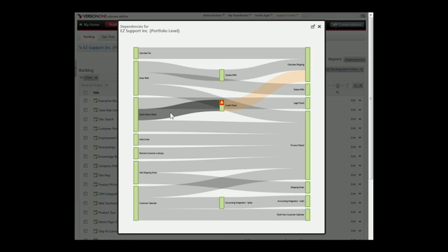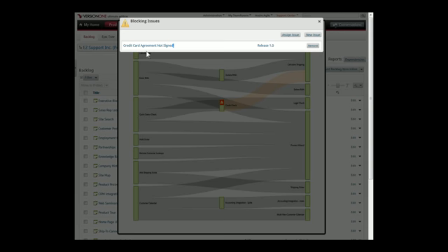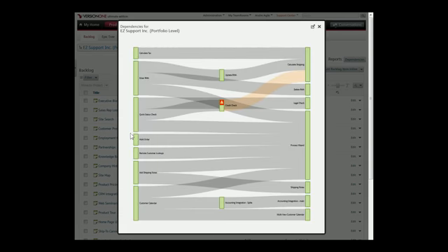And you can see here that we've got, in some cases, a chain of dependencies occurring. And if quick status check is completed, then credit check is still going to need to get done next. And right now we have a blocking issue on that item. So in addition to seeing where you may have issues with your most important dependencies, you're also getting a feeling with this dependency report for, across your portfolio or your program, what's the overall amount of cross-team dependency that I have occurring.